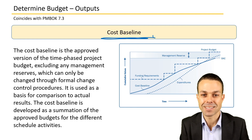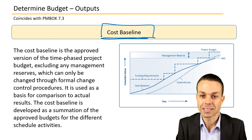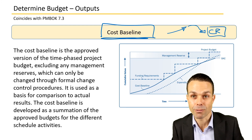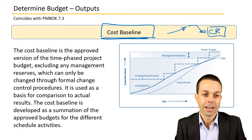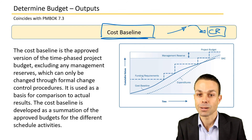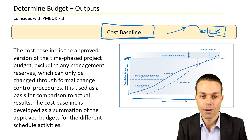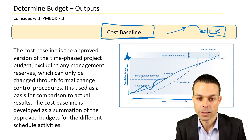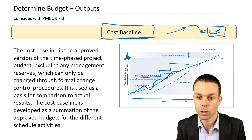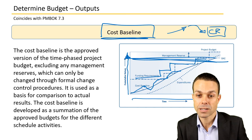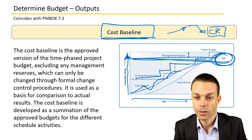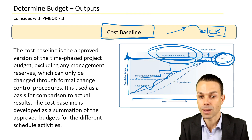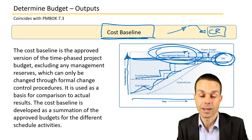The outputs for determining the budget include the cost baseline itself. This is the baseline cost document, now locked in place — if we want to change it or bring it back on track, we need to go through a change request so everyone is on the same page. The cost baseline is the approved version of the time-phased project budget: we're spending amounts at various points over time. Funding requirements show where additional funding is needed, and if we reach our budget at completion, we may need to dip into management reserves for any unforeseen work.